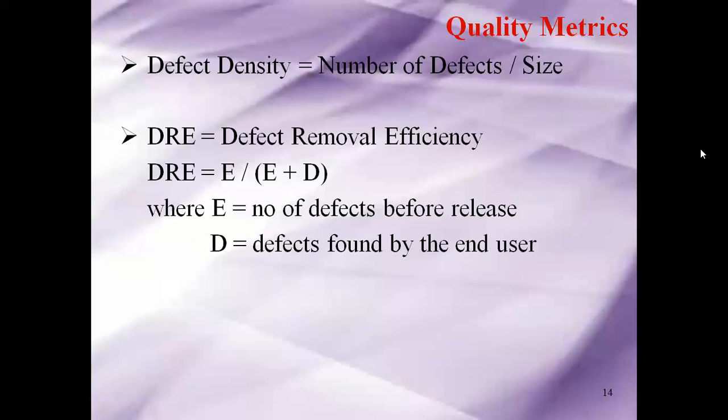Okay. So if you look at complexity, it means that you can classify all your features as high, medium and low. High will be where it is a new feature or something which is the new scope, or something which is going to be released only with this particular sprint or in that particular software release, which is going to be 6 months down the line. Then what happens is, if you don't understand the complexity and then write, definitely defects will creep in. So defects will depend on complexity and on the priority of the software features. Okay, does that answer your question?